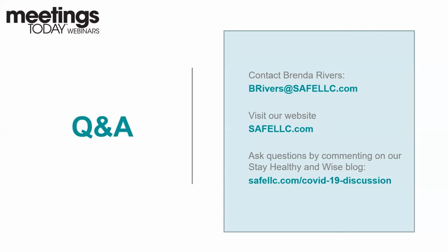Well, what I know about the event cancellation policies that I've worked with in the past is that, generally speaking, pandemic and most communicable diseases were not included. You had to purchase a special rider to include something like a global pandemic or even a communicable disease that strikes your particular location if you're in the tropics or whatever. My experience is really just based upon what I've had with my clients. I always recommend it, and most clients have felt that it's too expensive and they didn't need it.